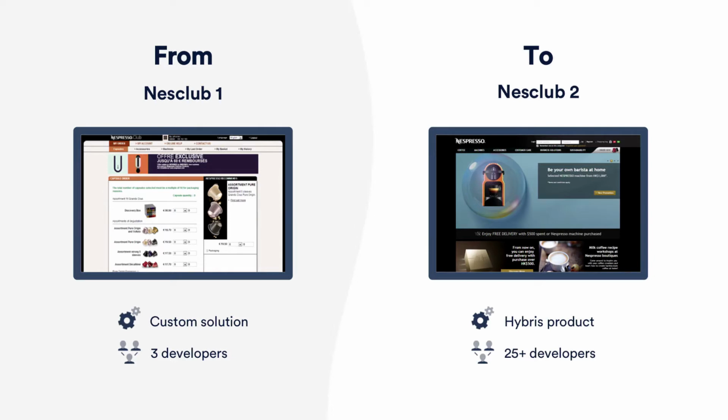With Hybris, we hired a supplier with a fixed-term, fixed-price contract. We launched an RFP, and the supplier whose price was 2 times lower than the others was selected. We onboarded 25 people, both on-site in Lausanne and nearshore.